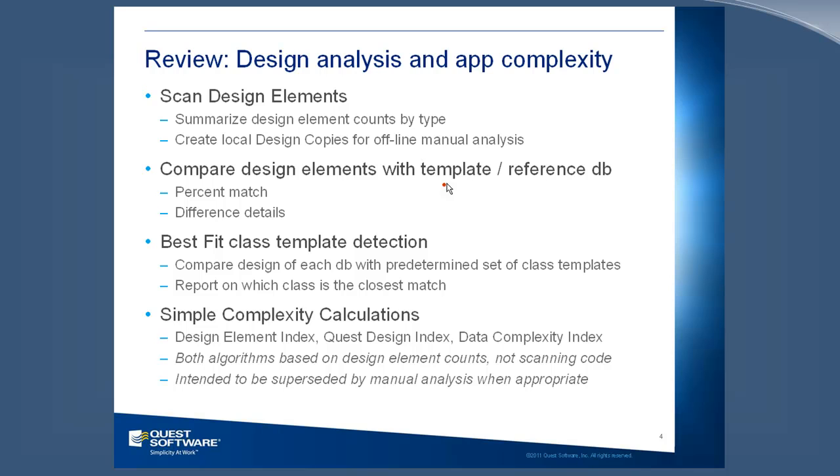copy. And this is also useful for comparing any two databases. It doesn't have to be a template. You can compare any two databases and we'll tell you how much it's changed. And this is a pretty useful thing when you're doing costing of applications and estimations, because if you know that it's truly based on a template without modification, then that will influence your estimates of how you're going to migrate it, because all the applications based on that one template could be migrated with one migration job and one development job if you're doing development.